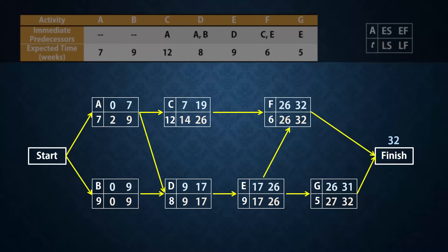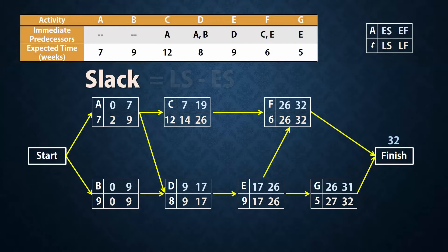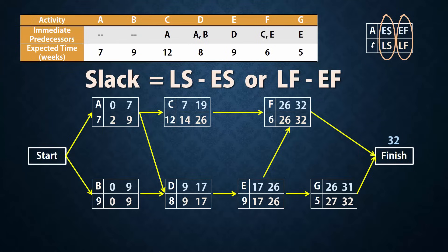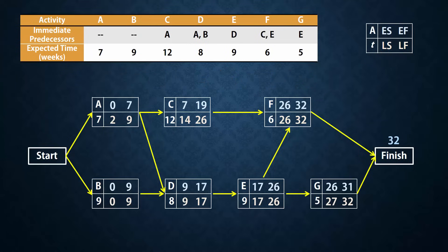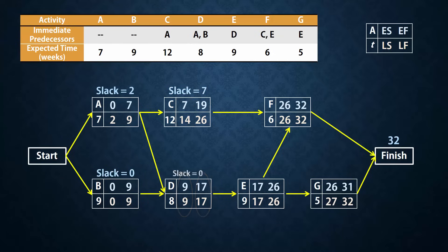Slack for an activity is defined as how long the activity can be delayed without extending the project's completion time. It is calculated as LS minus ES, or LF minus EF. So the slack for A will be 2 minus 0, or 9 minus 7, which will be 2. The slack for B will be 0. For C, it will be 7. For D, 0. For E, 0. For F, 0. And for G, 1.